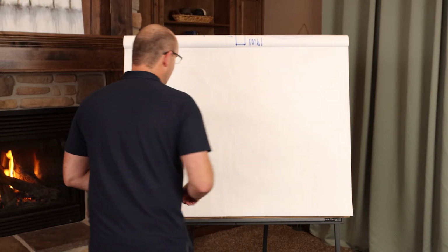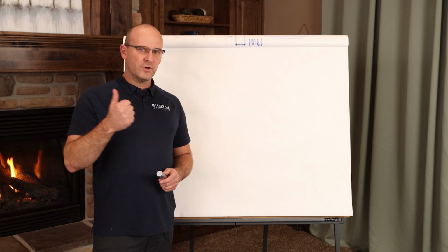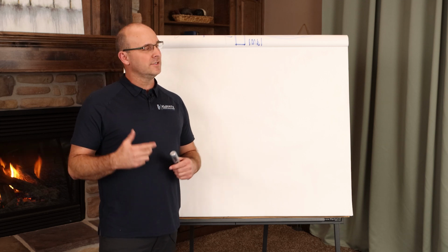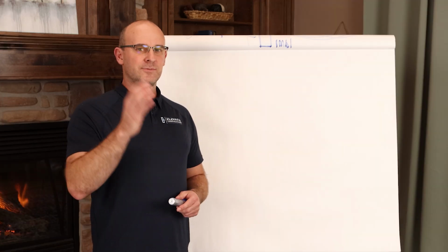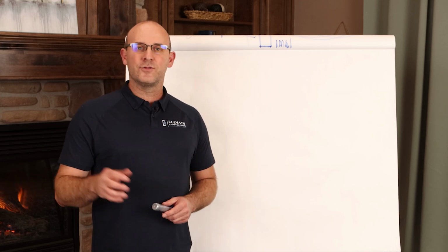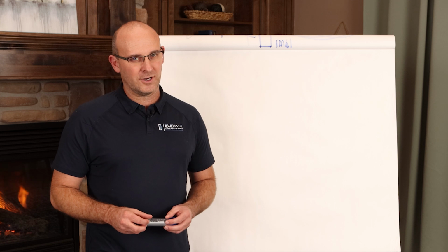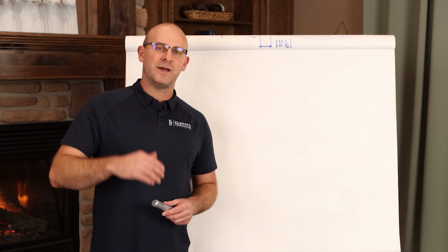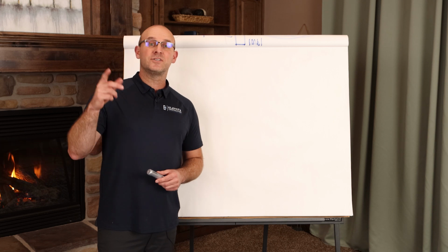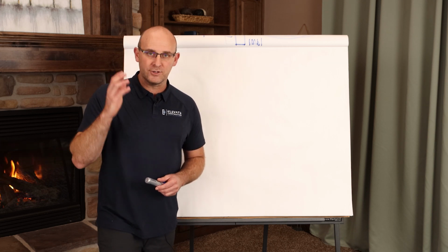So, if you rush and push and panic, you will finish late. If you work overtime, you will finish late. If you start working too many hours, you will finish late. If you add too many materials to the job site and put it in people's way, you'll finish late. If you throw money at the project to solve problems, you'll finish late. If you increase work in progress on the project above capacity, you will finish late. Any of these pushing strategies, in addition to adding labor above necessary levels, will just slow down your project.